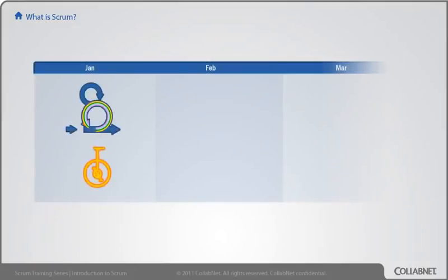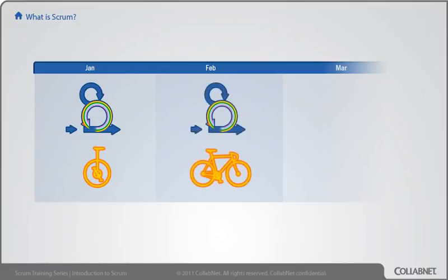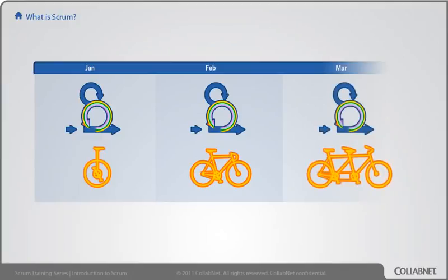Right from the first sprint, a Scrum team tries to build a working, tested, potentially shippable product increment, even if it starts out small. Every sprint they demonstrate what little bit of shippable product they have to everyone. Customers often need to see the wrong product before they can specify what they really need. With short iterations and more feedback, we have a better chance of discovering the right product. While the product owner doesn't actually have to ship every sprint, it's the team's job to make it possible.